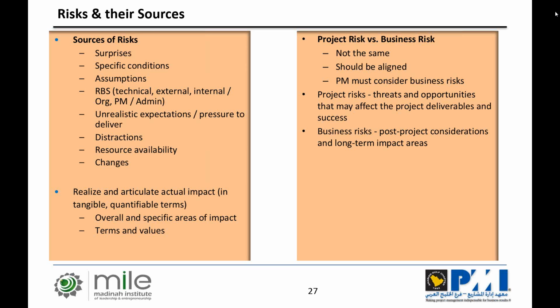Assumptions. Most of us don't like assumptions. Most of us treat assumptions like a necessary evil. Unfortunately, assumptions are not an evil. Actually, they're very necessary to manage our project. All I need to do is to create a spreadsheet and track those assumptions, right? So say, what's the condition, what I need to know about it, who I need to know it from, and when I need to know it.